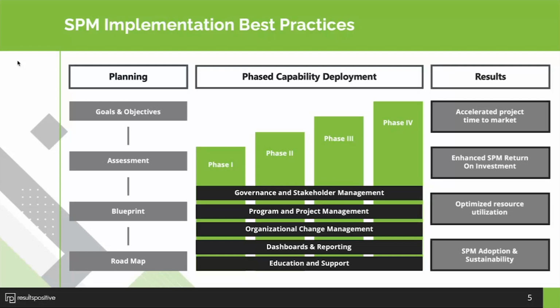If you've ever attended any customer's session when they talk about implementation, typically a lesson learned is to make sure that you focus more on organizational change and implement things from a phased perspective. So that's built into our overall approach. A couple of things here that I'll highlight and I'll include probably on the next slide as well. Not only have these phases, but make sure that you have organizational change, dashboards and reporting, and education throughout, besides the core blocking and tackling of the actual process and solution areas.